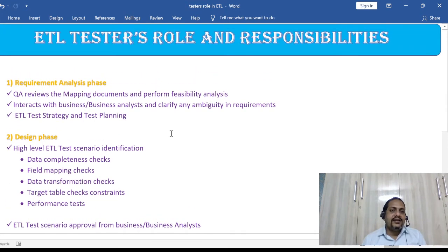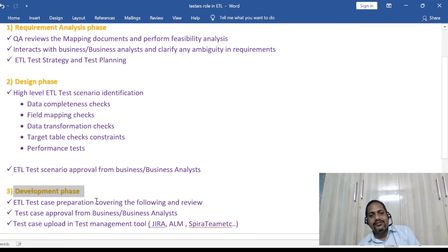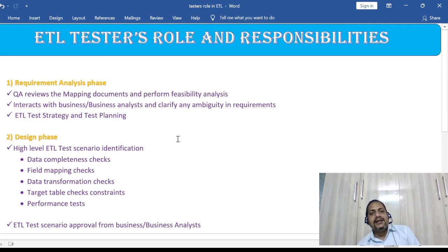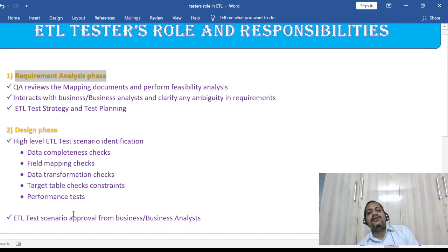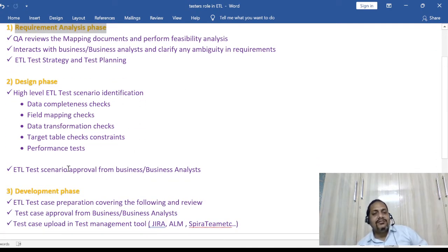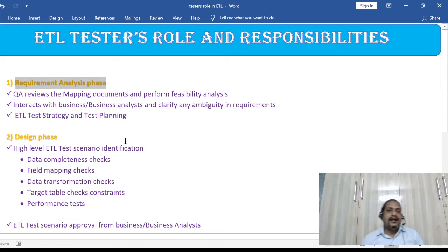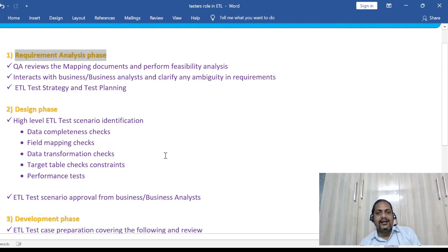And then all of a sudden a business requirement pops in, right? You are not in a position to accommodate that, because you have already moved to the development phase. Any changes introduced to the requirements at that point will have a high cost, which means we have to go back to the requirement phase, put in the same timing again, then the design phase again, and come back to the development phase. This was a time-consuming process, and hence there was a need to remove these kinds of issues going forward, and Agile came into the picture.